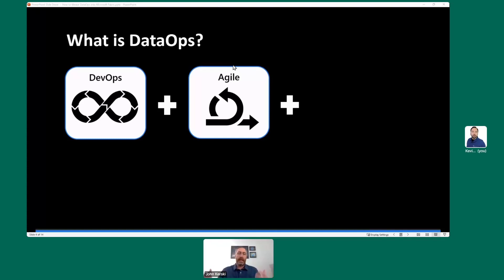The second aspect is Agile. Early on, I worked with project teams who would put a dashboard together and deploy it three months later to ask for feedback. In that time, the customer would change their mind or feel dissatisfied. Agile coaches you to break deployments into logical chunks you can release on a weekly or bi-weekly basis, show incremental improvement, and pivot quickly if the organization has a strategic change.